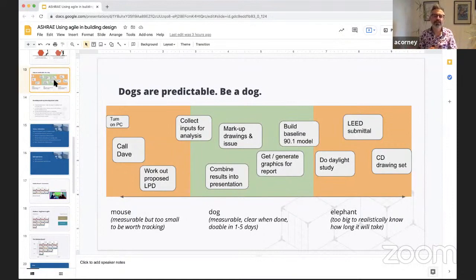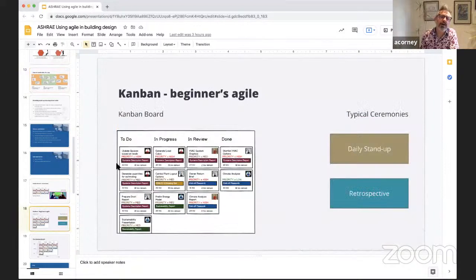So one of the ideas, if you are working on a Kanban board as a team, ideally if all of the team tasks are prioritized properly and someone can pull in the top task, then that top task should be pulled in by the first person who's capable of doing it, right? So in a very brutal situation, if you have a lot of the same tasks, ideally you have different people doing that task.